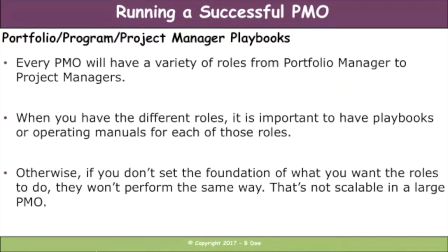Everyone needs to know what they need to do on a regular basis. Now, we're not talking about micromanaging. We're talking about setting up the foundation of the things that you expect the role to do and perform the same way. If you've got 12, 15 project managers, what are all the project managers doing? Well, you're going to document that in the playbook, right? You're going to want them to do Friday status reports, financial reports, weekly risk management, weekly issue management, weekly whatever the case may be, but you're establishing the foundation. You're telling the portfolio, program, and project managers what you're expecting out of them as they drive through and do the work.